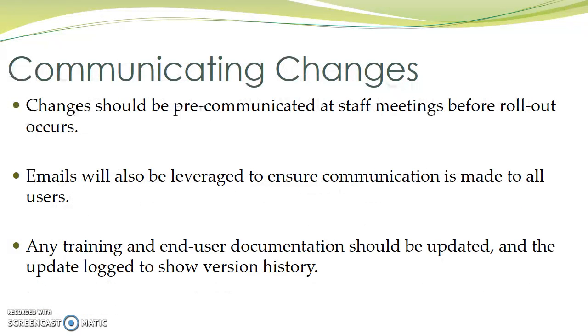Communicating changes. Changes should be pre-communicated at staff meetings before the rollout actually occurs. Emails will also be leveraged to ensure communication is made to all users. Any training and end-user documentation should be updated and the update logged to show version history.